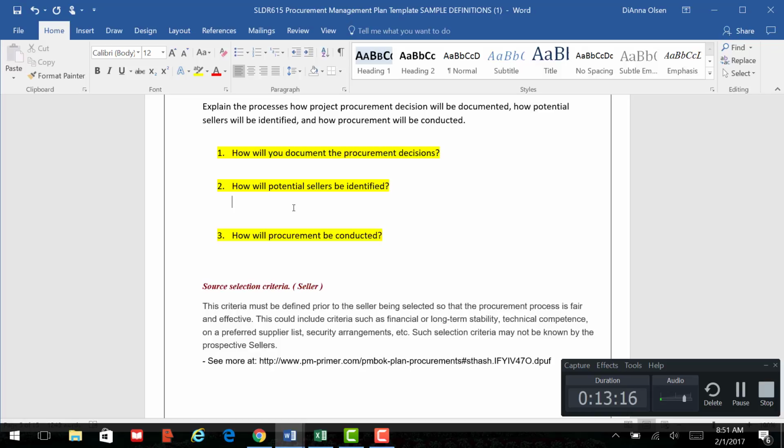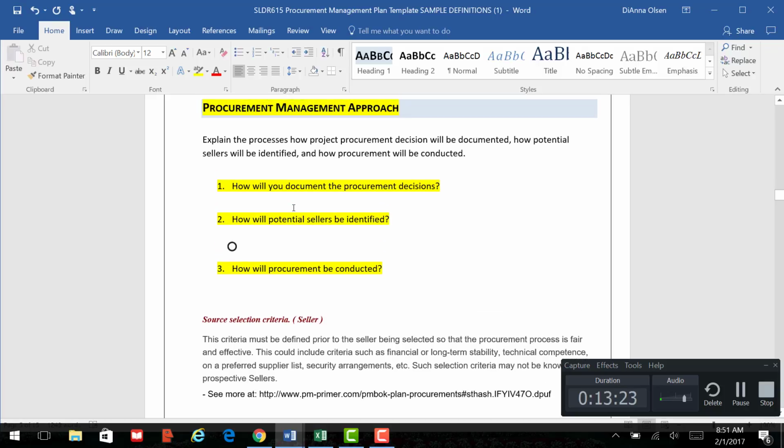Or I'm only going to look at the contractors, a company that has sent me information on their wood flooring, if they have a better business rating, or they have reviews by so many referrals that are 4 stars, or at least 4 stars out of 5, if not 5. So you're kind of setting this criteria so that it isn't just a hodgepodge of hiring people without any methodology or process behind it.